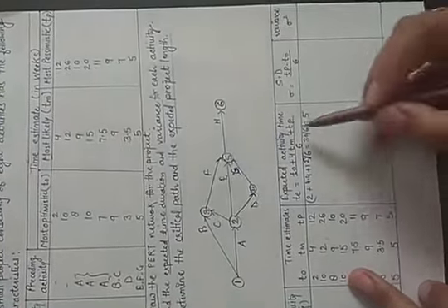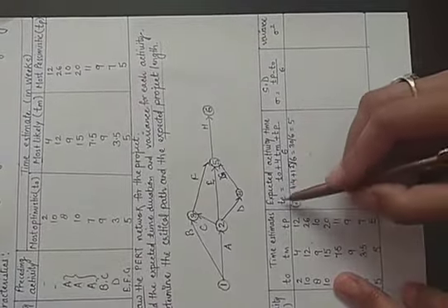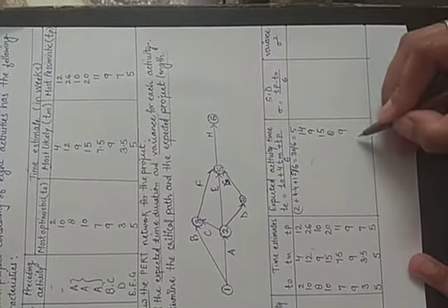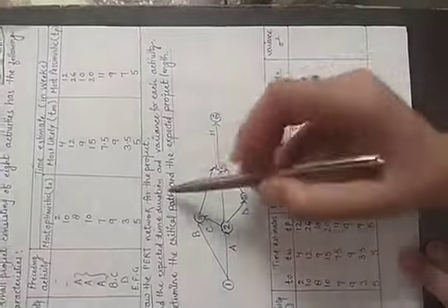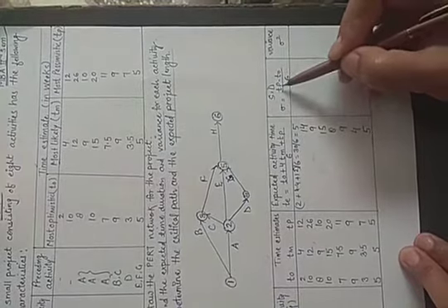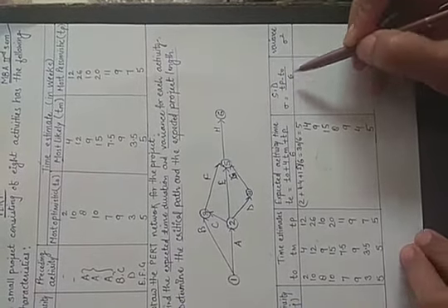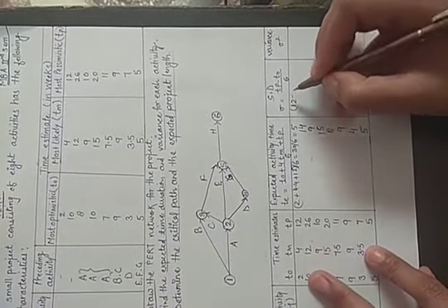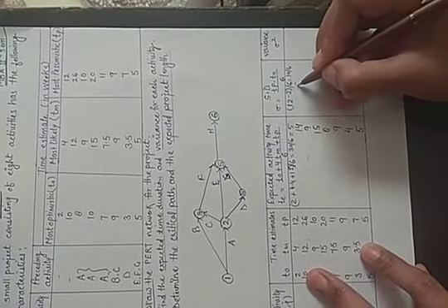Similarly, we will put all these values in the formula, and we will get the expected values. So next will be 14, 9, 15, 8, 9, 4 and 5. Alright. So now for variance we have to find out the standard deviation sigma by the formula (TP minus TO) divided by 6. We will put the value of TP, the pessimistic time, first, 12, minus TO, optimistic time, 2, divided by 6, that is 10 upon 6, and if we divide it will be equal to 1.67.